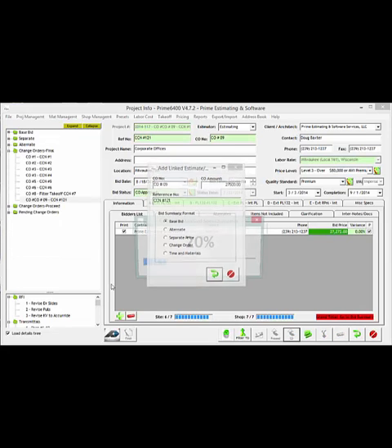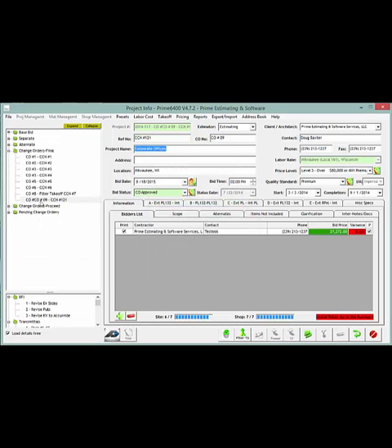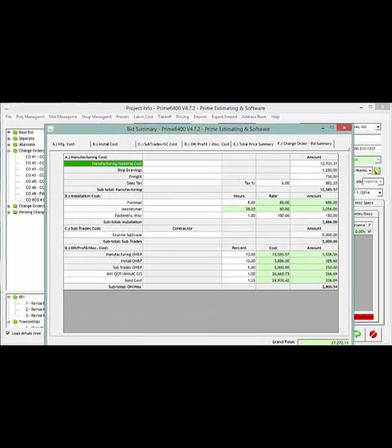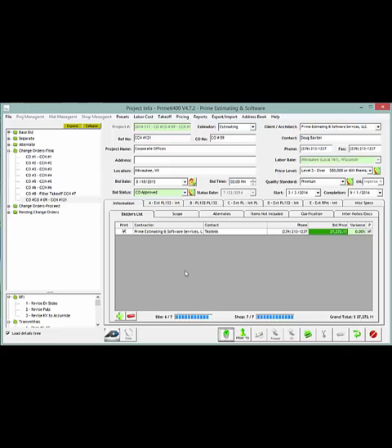And once we do that, in return, that now resides up top here under change order number 9 under your approved change orders. If you have the project management module as part of your package, it will be sent there to your schedule of values, if you've created one, to bring those values forward. But at any time you can refer back here, go back and look at all the information that was provided, and of course you can come back and reprint what your requirements are.